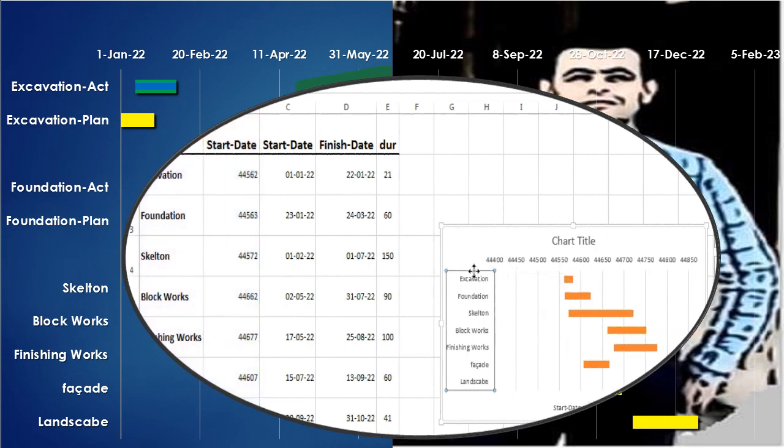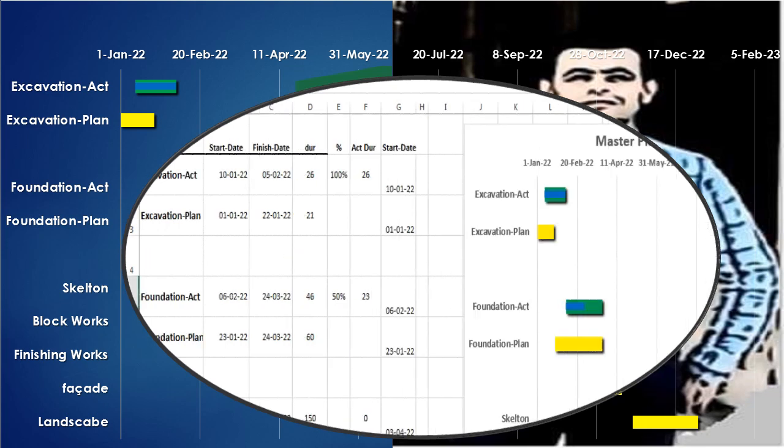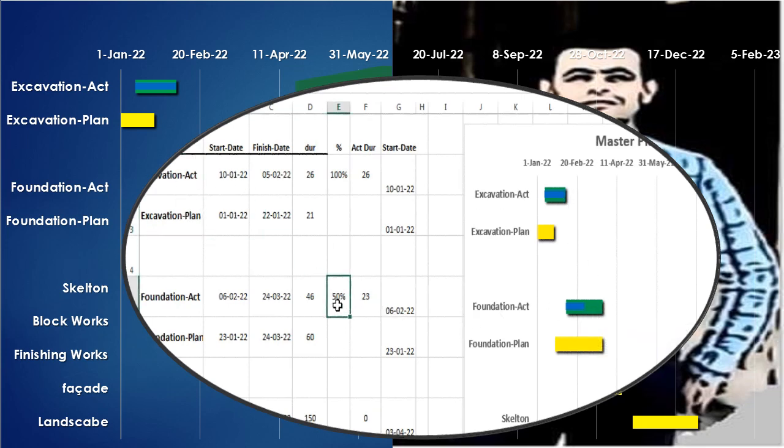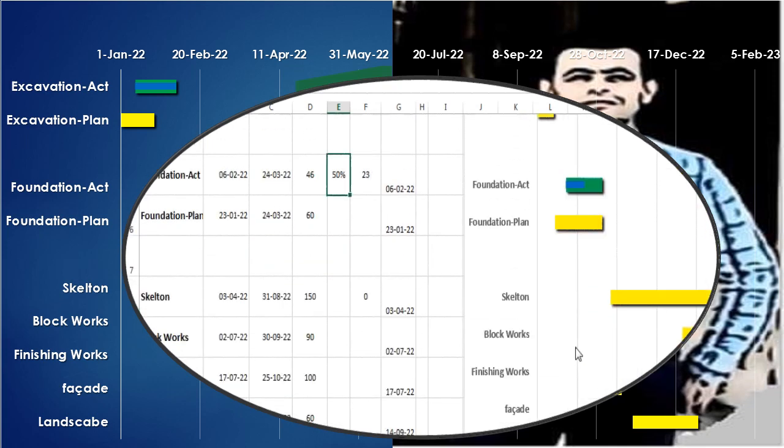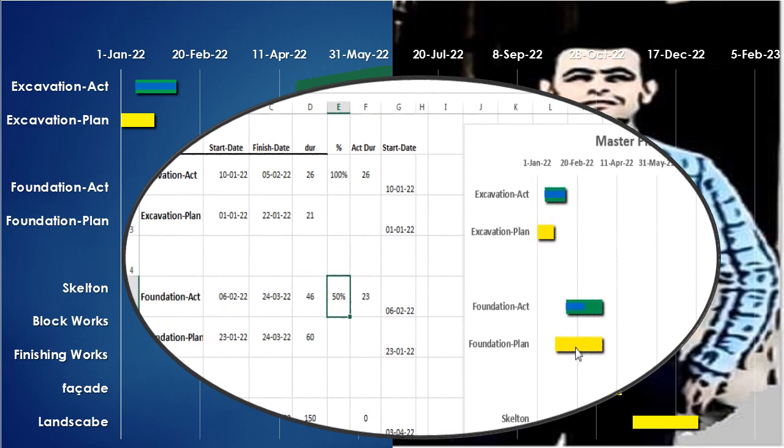After that we proceed to our next step to learn how to follow up the work progress depending on the data representing the actual status, including the actual dates, the actual duration, and the percentage of completion for each activity. Those data will be reflected on the Gantt chart to represent the actual and the plan in just seconds.